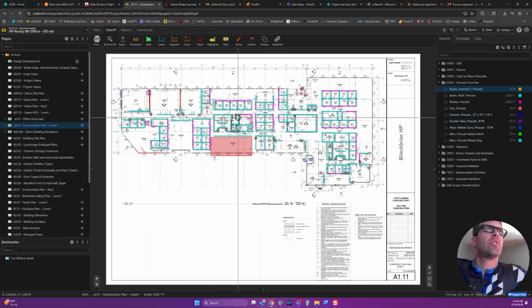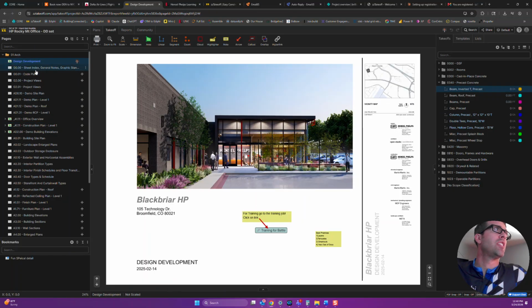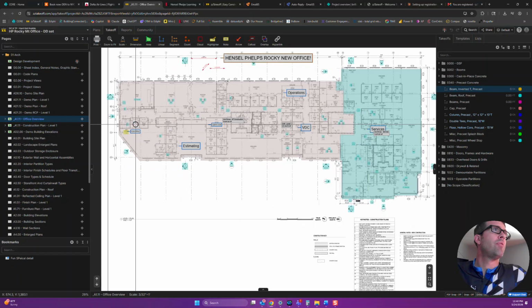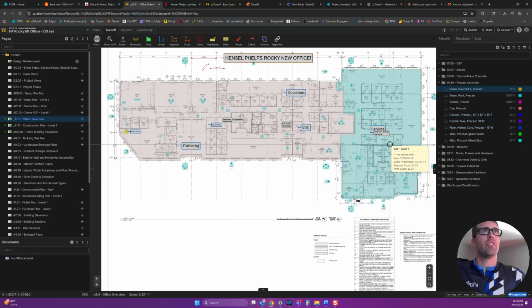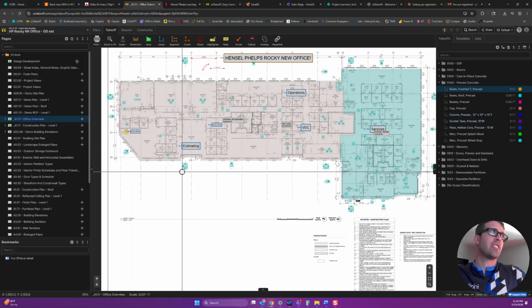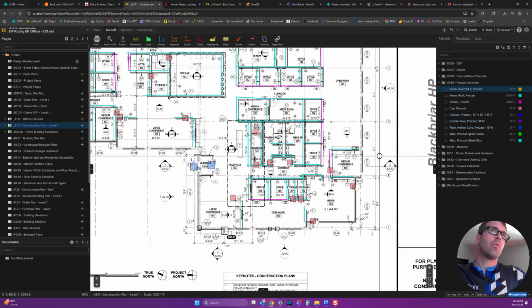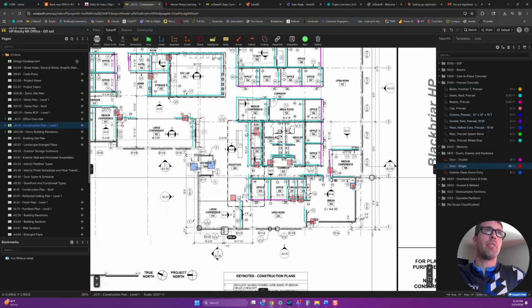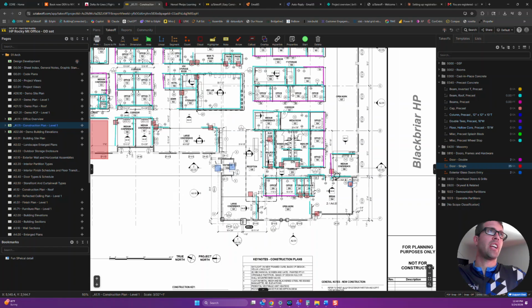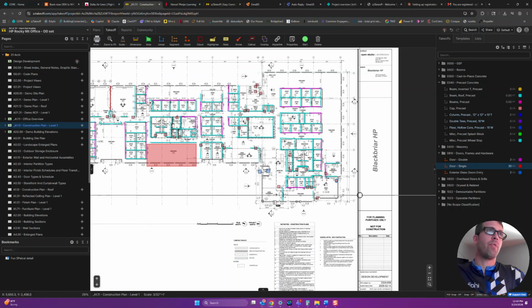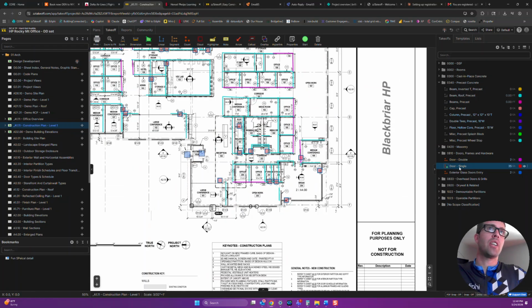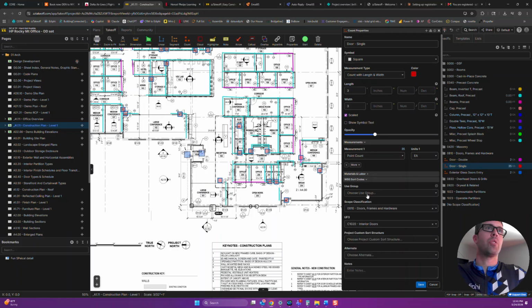So let's talk about breakouts. Let's say, well, actually this project, we have left side is operation, right side services or service business unit. So we had to actually separate all the costs on that widget. Right now, the old workflow is this: you had to grab a door and pretend you're doing your takeoff. You'd have to organize your takeoff that way at first. So to do that, I would double click on this door, and I would go to my WBS sort codes and call it services. Now everybody can.